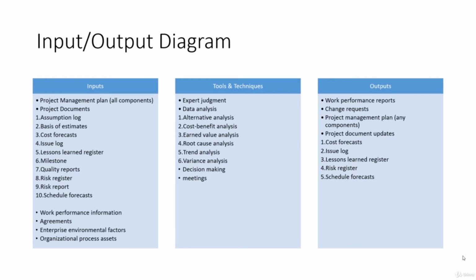So things like that. The risk register basically is a list of threats and opportunities that have occurred so far in the project. And the risk report is basically information on the overall project risk, as well as any information on some specified individual risks. So you can say that your project is green if it is meeting all those deadlines and those milestones. But if it crosses that particular time frame, but is within some kind of range, let's say less than 20% deviation, then maybe it's yellow. But if it crosses that 20% and goes above the tolerance limit, then it could become red.